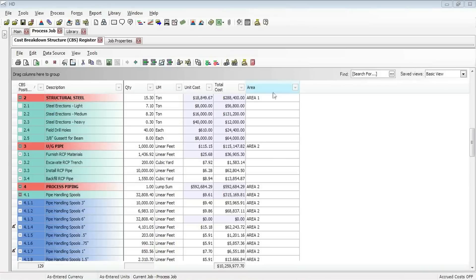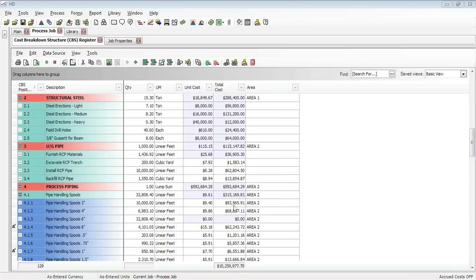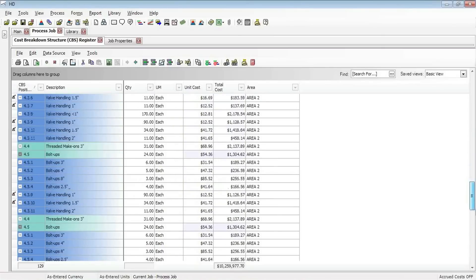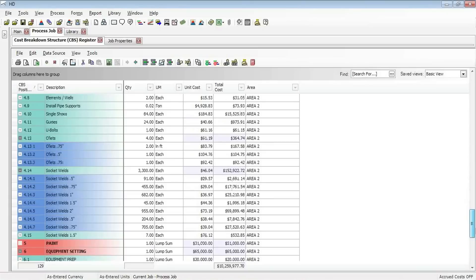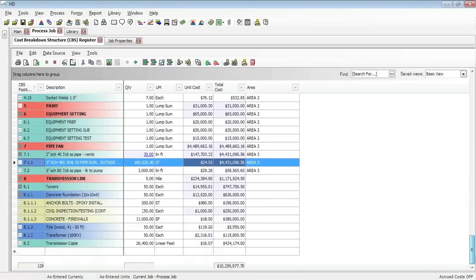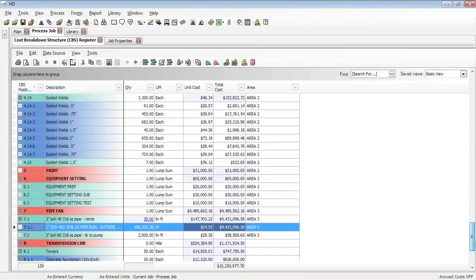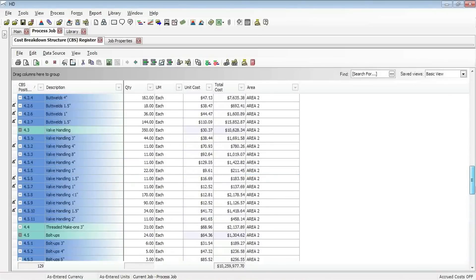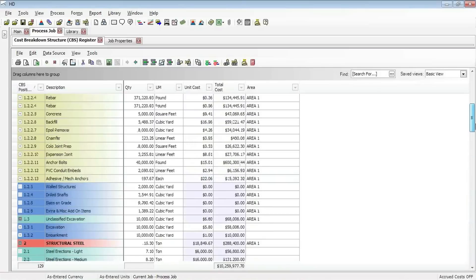As you can see, I have a column that I brought up. This is a user-defined field. It's actually a tag kind of field, and I've defined different areas that I'm assigning to the different cost items in the project that I'm working on. So I'm organizing it into the different areas, area 1, area 2. Some parts of the project are in area 3, and this allows me to be able to do things such as sorting and grouping.